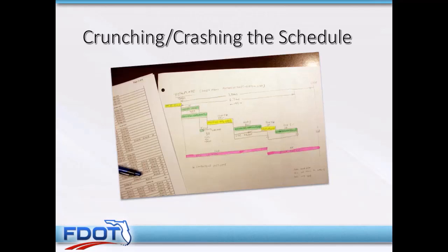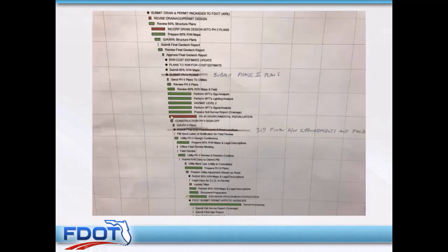But just realize, and let me jump back here real quick to the hot mess to show you another little real-life example. Here's a critical activity, here's a time bar, and here's a whole bunch of other little activities that are running in parallel. So when you have a situation like that and you're trying to compress this, you've got to compress these as well, because they're there too. You're going to have to compress everything. So it's not as simple as just reducing days on one particular event.